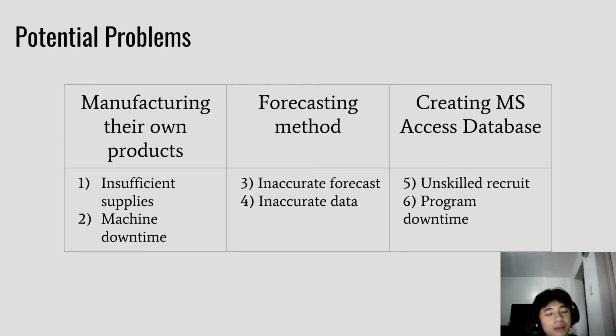Lastly, the program downtime. The risk event trigger is that there are instances where the program will have bugs and it will hang. This can impact the input of data, which will be delayed. The likelihood is 3 and the severity is 4, which has a total risk score of 12. Always check for program updates to prevent this event from happening. But the corrective way is to go to a computer or program repair shop to fix the software.